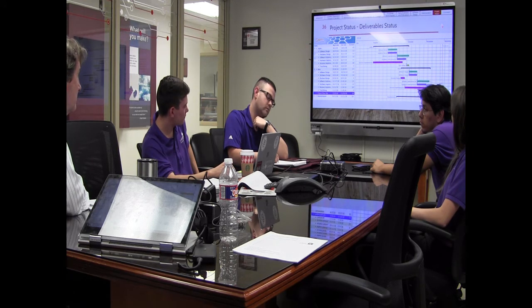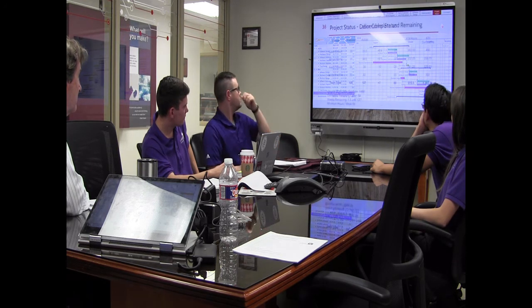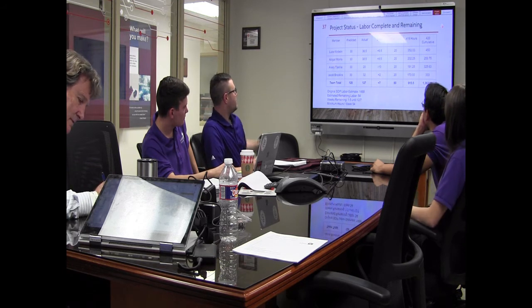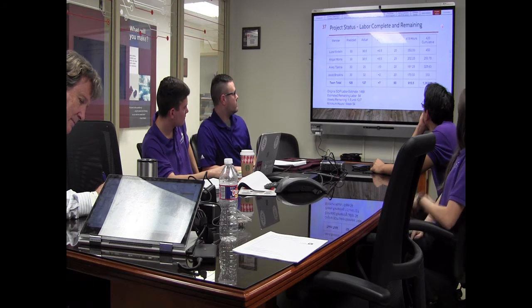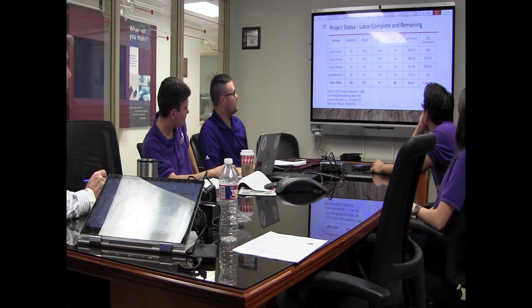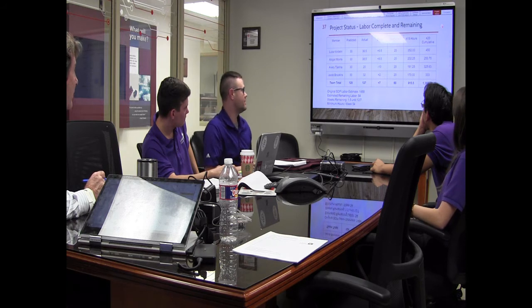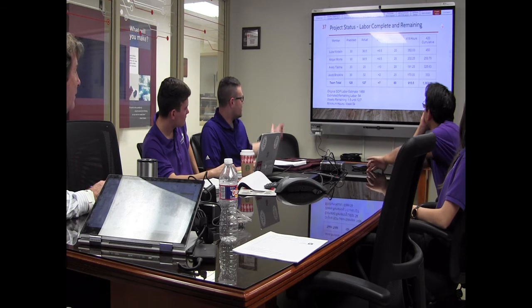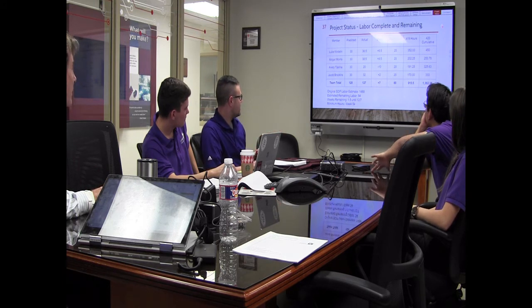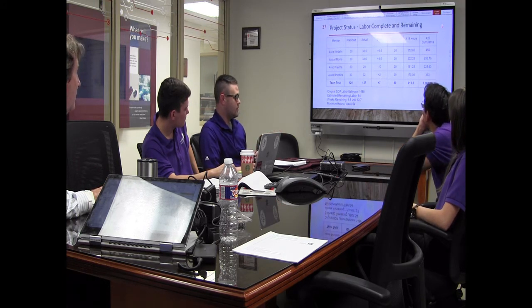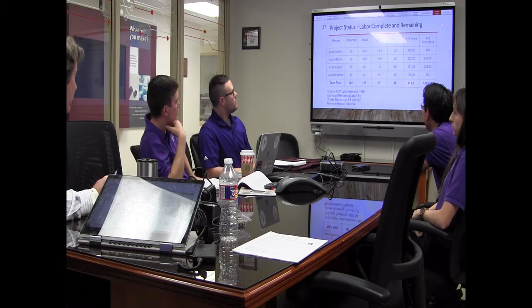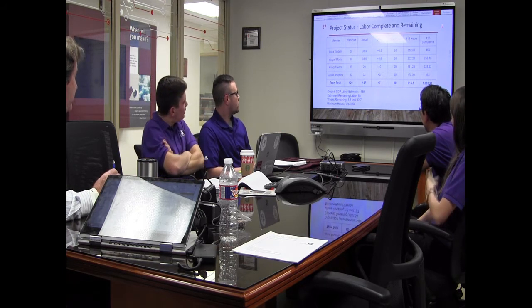Go ahead. All these sound pretty good. Yeah, so the original SDP labor estimate was 1488 hours. So far we've spent, in only capstone 2, 1,362 hours and .38. And as far as our RAM goes, it looks like we're about 54 hours away. That doesn't include some of these items, so I'd say it's probably in that range, less than 100, and that does include documentation. Okay, yeah, but we're close.